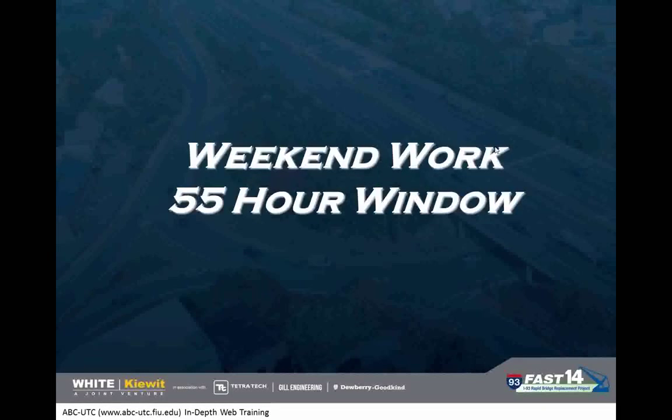Talk a little bit about our weekend work. So we went through, in a nutshell, an idea of what happens during the week. Those previous pictures, in 3 slides, don't tell the whole story. There's a lot of work that had to happen during the week to facilitate this 55-hour weekend work window. And basically, you would be finishing with those 14 bridges a week ahead, sometimes 2. In advance, you would complete all your prep work for that following weekend's bridge, and that followed through the whole job.